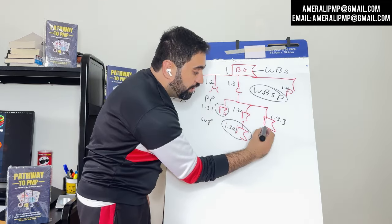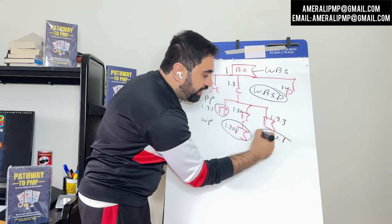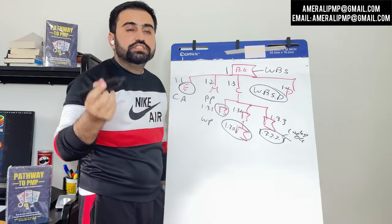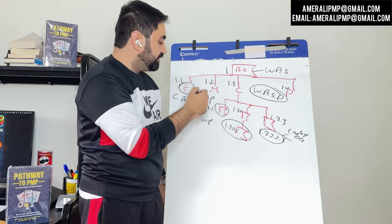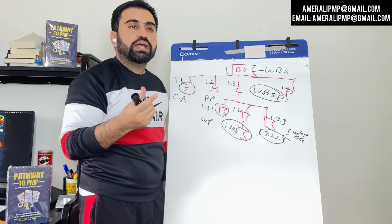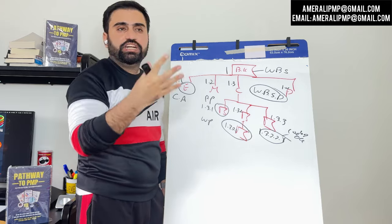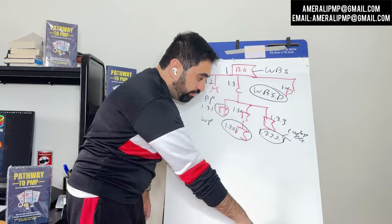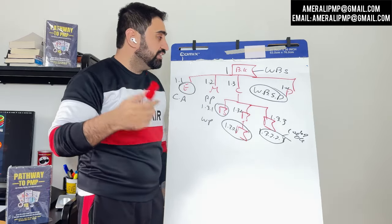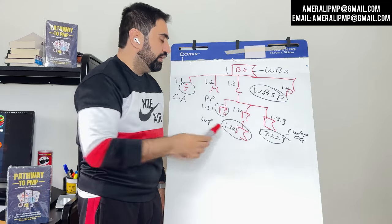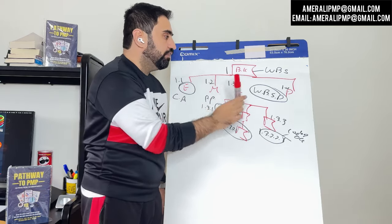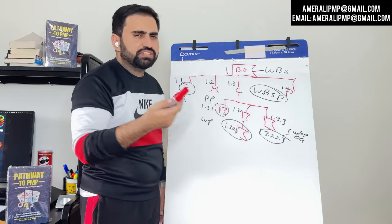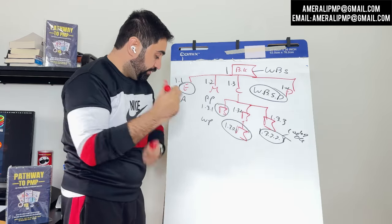Those numbers — like 1.3.2.2 — are known as the code of account. The WBS dictionary uses these codes. The lowest part, the work package, is the smallest unit you can work on. As a rule of thumb, a work package should be minimum 8 hours and maximum 80 hours. The control account is what management is more concerned with — they want to know about mechanical work, civil work, and plumbing work at that level. The planning package is used by the planning team, while work packages are used by the execution team.